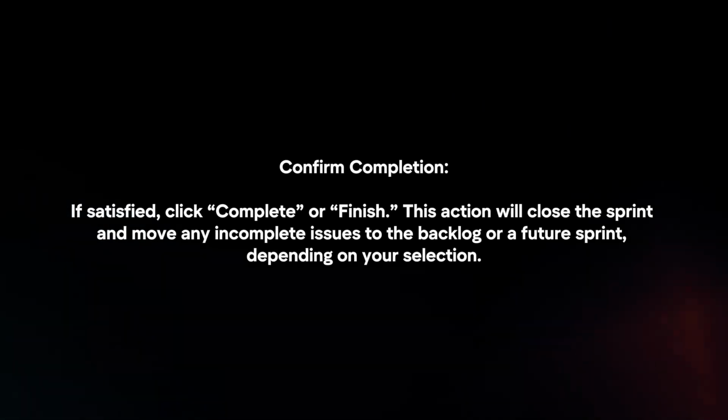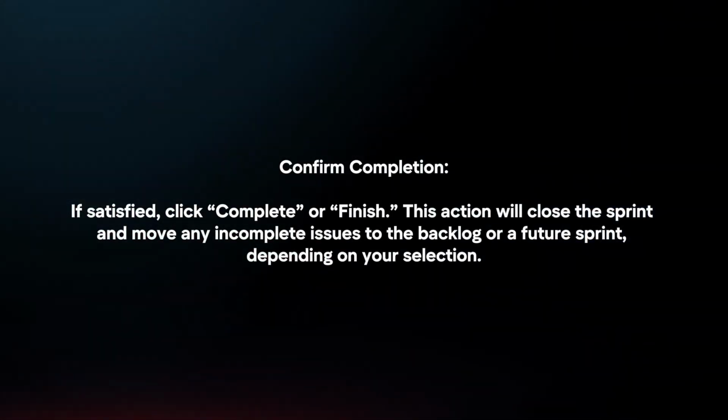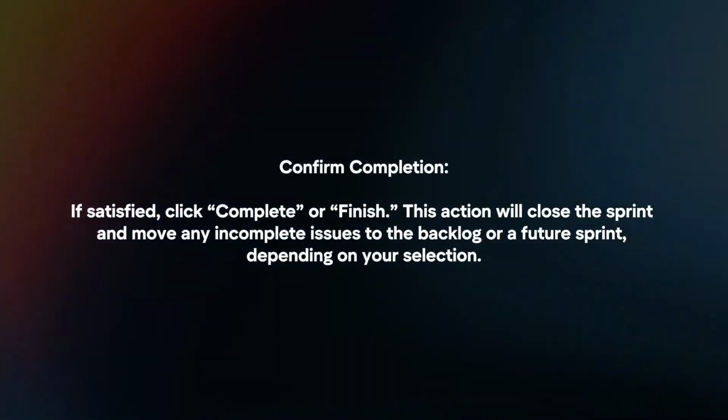Confirm completion. If satisfied, click Complete or Finish. This action will close the sprint and move any incomplete issues to the backlog or a future sprint, depending on your selection. Review sprint report.